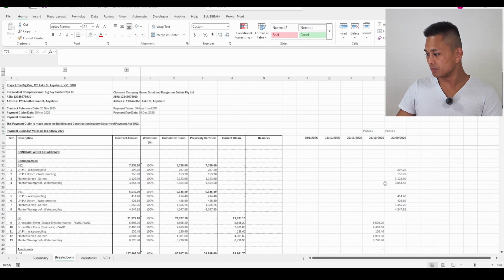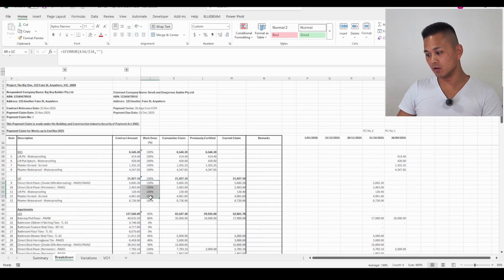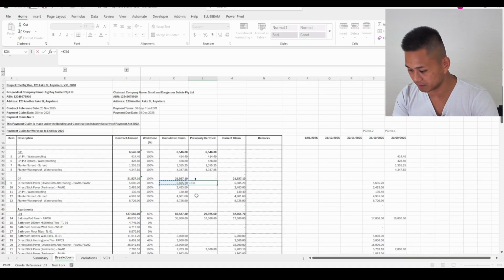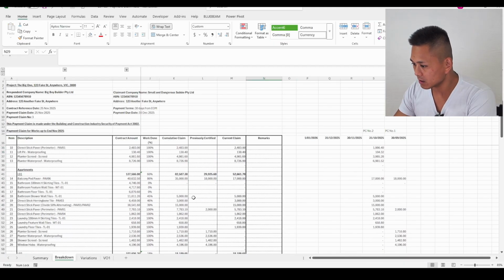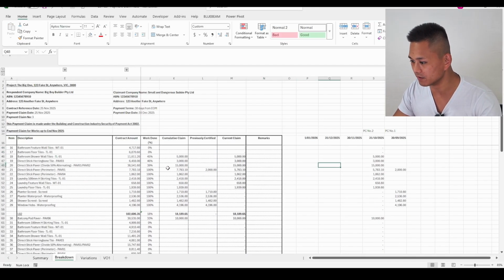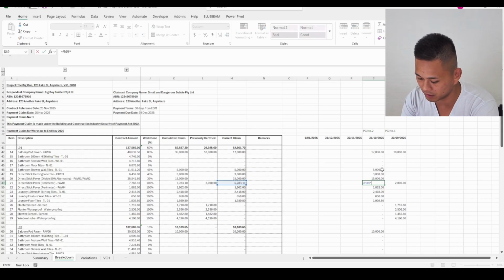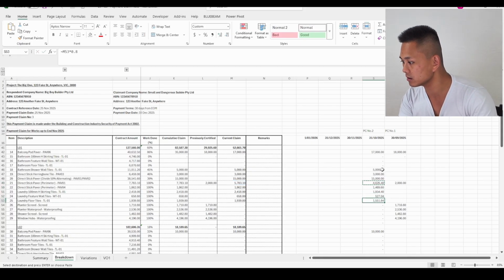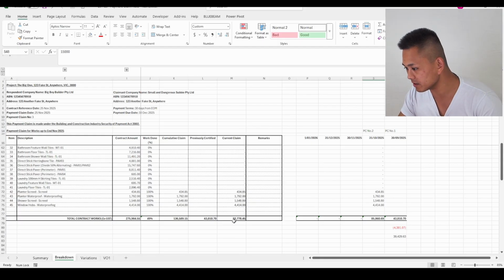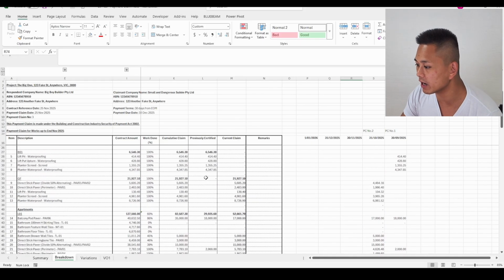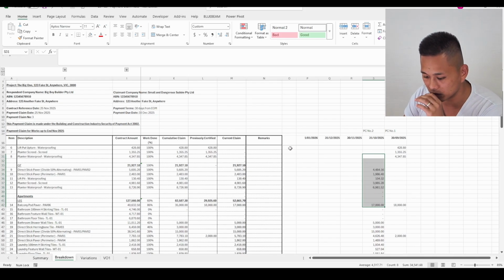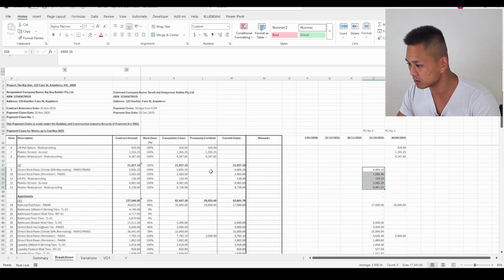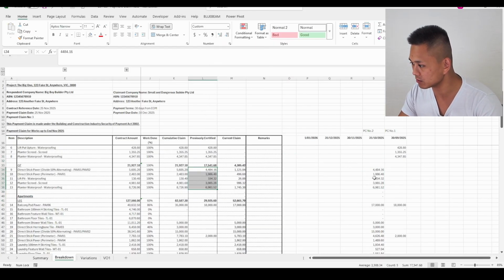Now, let's say the builder shortchanges again and says all of ground floor is only 80% done. So that times 80%, like that. And then we want to make sure that we're tracking what the builder has paid us. Let's say he also short paid all of this 80% as well. So we'll do that times 80, and then hard code it. So let's say we claimed 92 and he only certified 85. But when we update this previously certified, we need to be taking the value that he certified. I can't stress this enough. Understanding this will stop all the bookkeeping issues from constantly happening. So we put that in there, because that's what he certified.